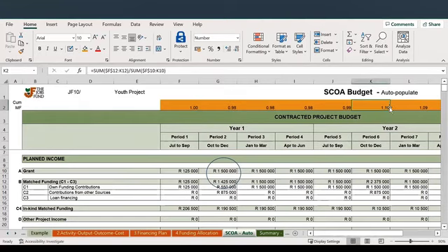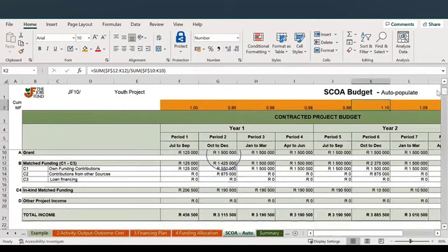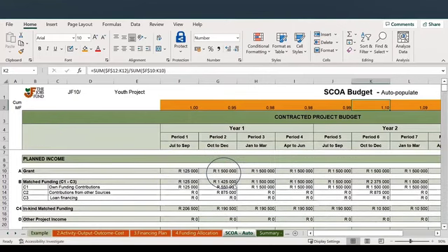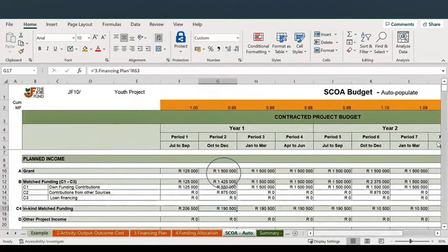They do correct it later on, but we needed to on a cumulative basis, and this is checking on a cumulative basis that our match funding ratio is intact. Another thing to highlight is that when calculating the match funding ratio, as when we're doing with eligibility, the in-kind isn't included. So this is looking at just the cash contribution. The in-kind is not included in our ratio, and it won't be considered when assessing your report to determine how much money we should be releasing.